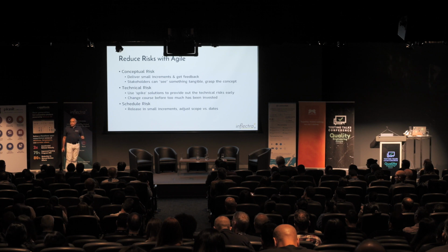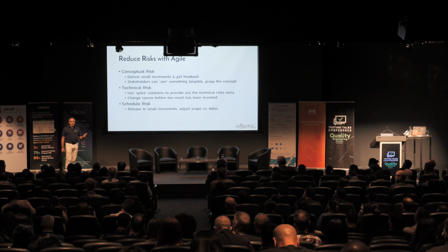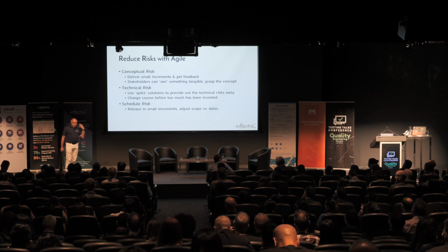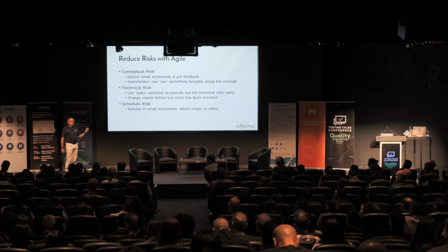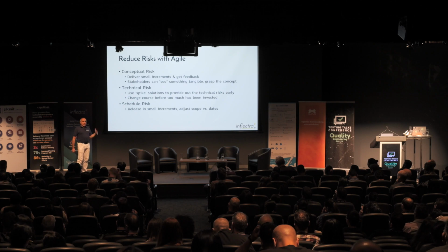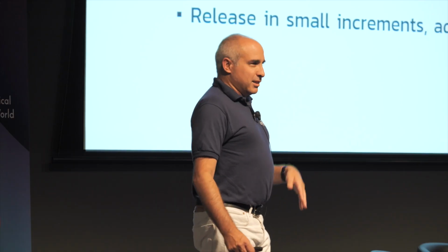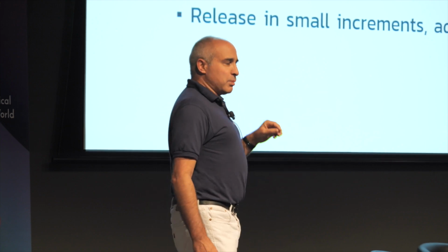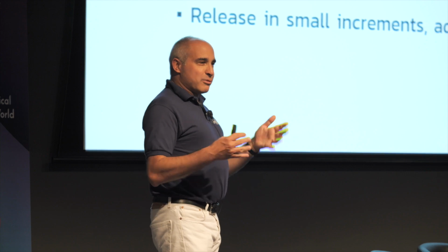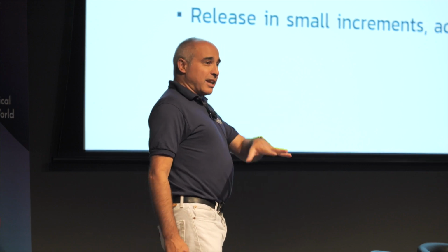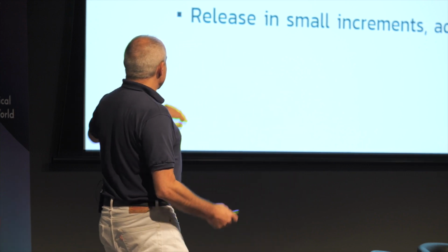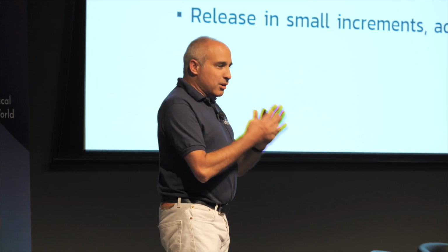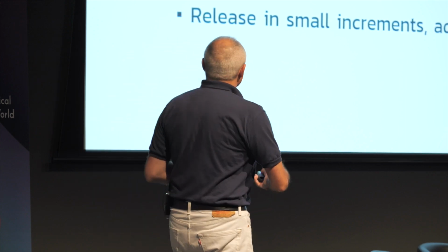And if ever you're doing an MVP, or if teams are doing MVPs, as a tester make sure that people are choosing an MVP that actually proves out technical risk. Too often we see people do an MVP that doesn't prove out technical risk, just feature risk. Like, does it have the right features? Does it have a single use case? But they're not testing out the most tricky things. So as a tester or as a developer, you have a responsibility to find the areas of technical risk and deal with those. And then lastly, of course, Agile helps with schedule risk because you're delivering in sprints faster.